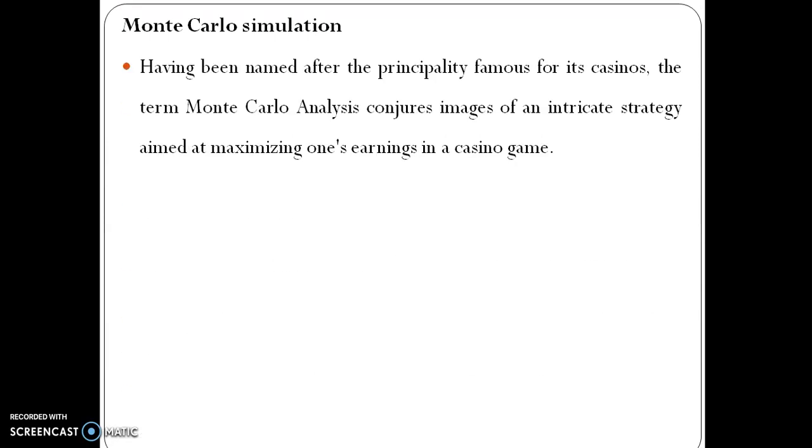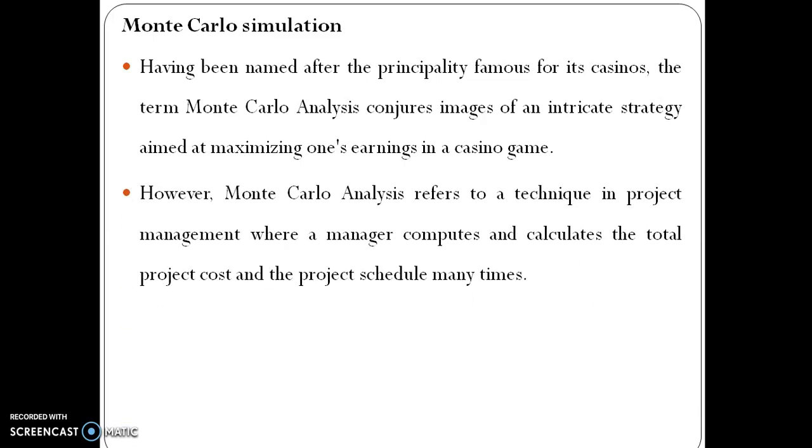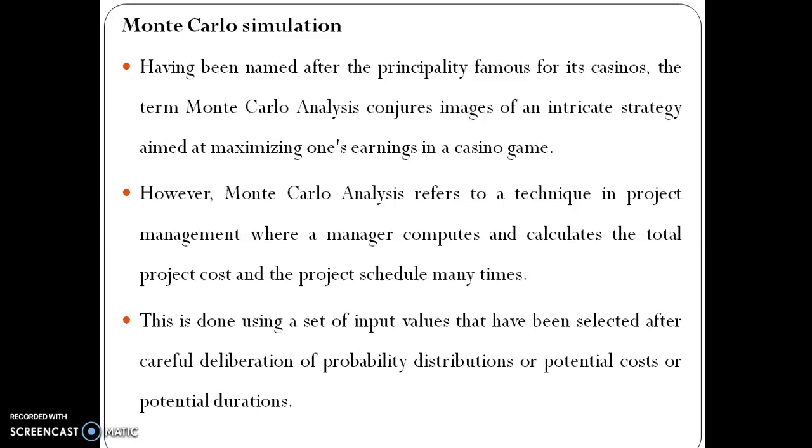Monte Carlo simulation. Having been named after the principality famous for its casinos, the term Monte Carlo analysis conjures images of an intricate strategy aimed at maximizing one's earnings in a casino game. Monte Carlo analysis refers to a technique in project management where management computes and calculates the total project cost and the project schedule many times. This is done using a set of input values that have been selected after careful deliberation of the probability distribution of potential costs or potential durations.